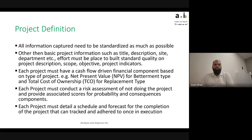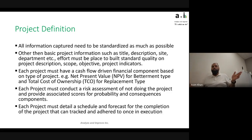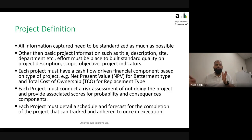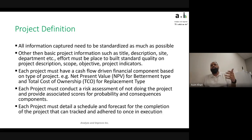All information captured needs to be standardized as much as possible. Basic project details such as title, description, site, and department must be included to build standard quality. Sometimes templates are used but not everything gets filled out — if you have cashflow, NPV, or risk reduction information, that's often considered good enough. But for a proper portfolio management system, you need all the fields filled in because they become important in later stages like prioritization, when you need to reduce your budget or switch strategy mid-year. Cashflow information — NPV for betterment projects or total cost of ownership for replacement-type projects — must be there, as it's a major factor in prioritization.